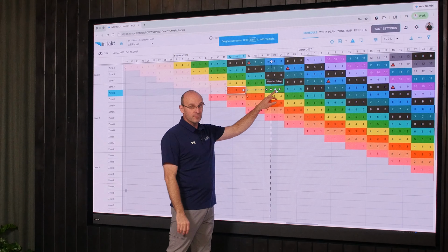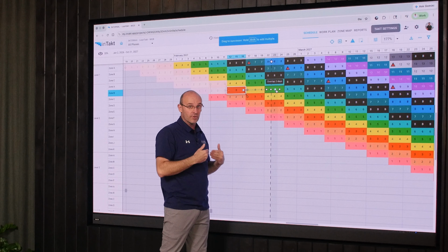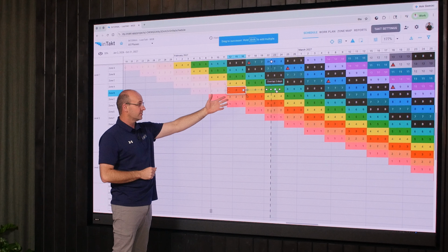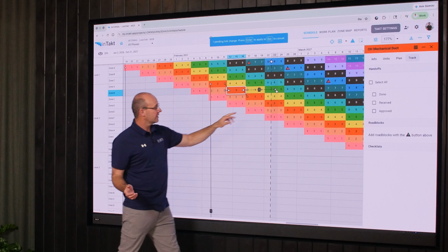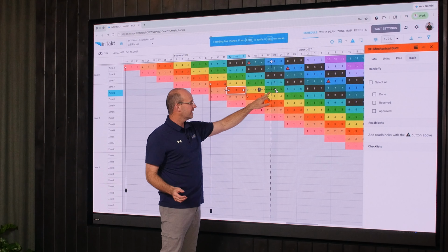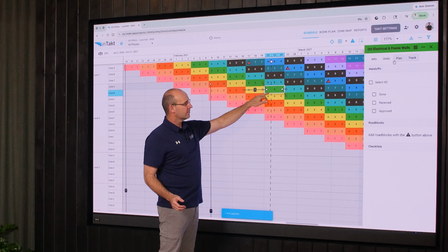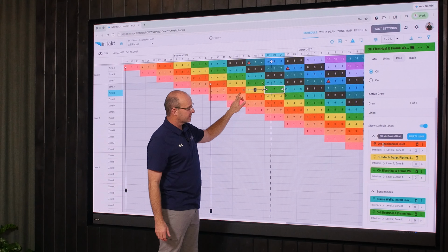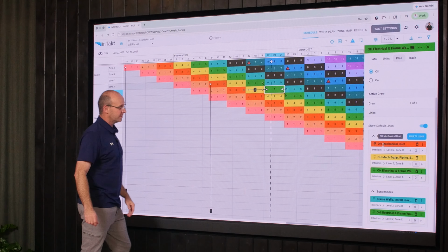You very much want to be able to tie to a portion of, or an intermediate point within, the actual task itself. So Danny can just let go, and it's logic tied. Now if you click on that and go to task properties, if Danny goes ahead and clicks on this activity and goes over here to plan and then scrolls down, you can see that those logic ties are active right here. So it's genius, and that's going to export to your CPM.